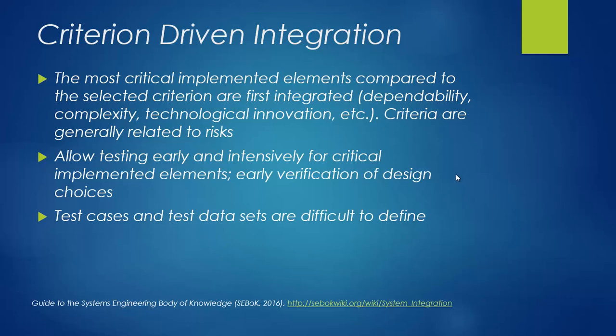In this technique, which is the criterion-driven integration technique, we first integrate the most critical elements compared to a selected criteria, such as dependability, complexity, technological innovation, and other related criteria.